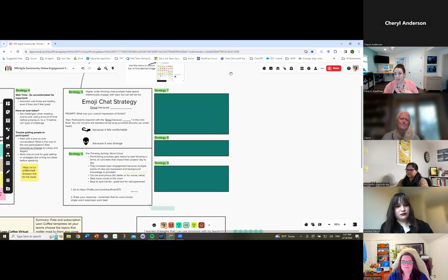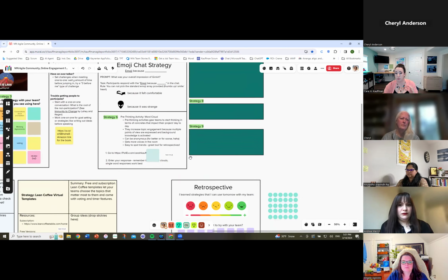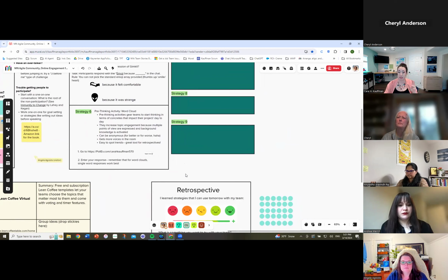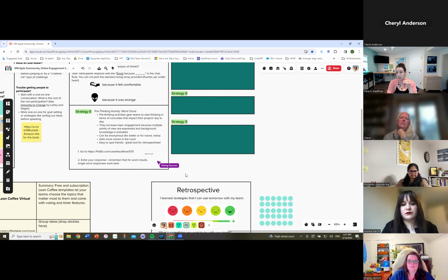But I use it on my teams as a pre-thinking activity before we jump into even things like planning or our retros or any of our major meetings or ceremonies. So it's a great way to start getting them to think about the concretes that impact day to day. So sometimes you can prompt them with, okay, what are our blockers? And now they're actually having to sit and think about what the blockers are before we have the conversation out loud, or what their impediment is. What is the dependency that we're dealing with? What are some of the dependencies you could predict running into in this sprint? And now they're generating them, they can build off of each other.